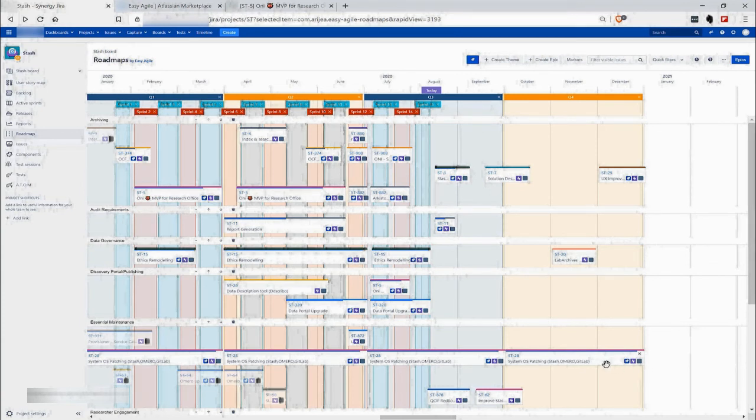So as a team, when you're looking at how to distribute the work that you're going to be doing in your product roadmap, you got to think, of course, about your resources. So how many people you have working on this. You got to think about the workload, the complexity of the different things that you're doing, and then how much you can actually realistically get done, right? And then you start mapping it out, spreading the different work across the different quarters, across the different months, and across the different streams of work vertically as well, all right?